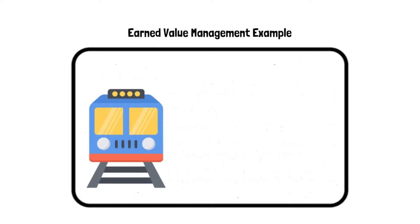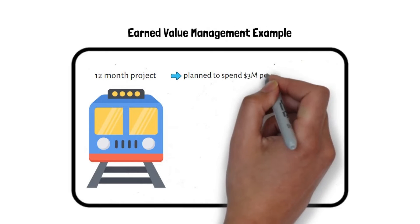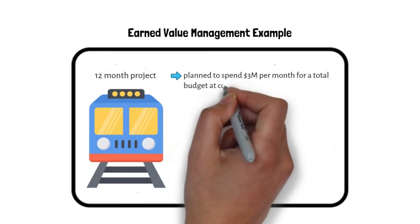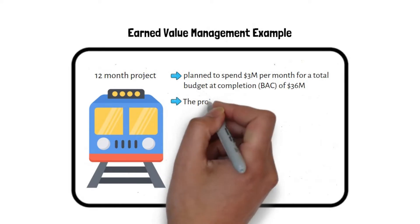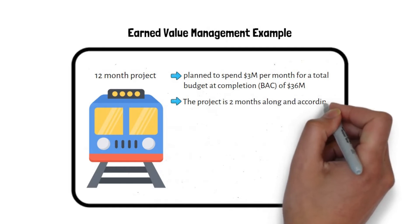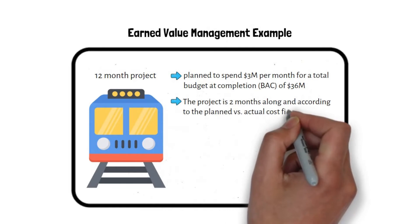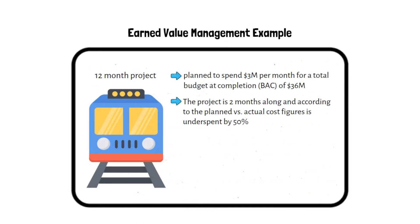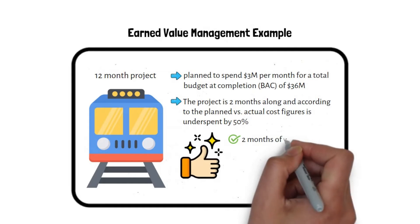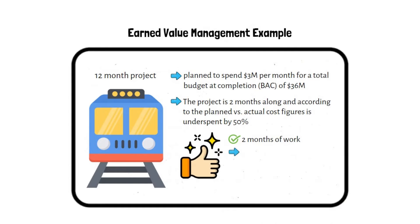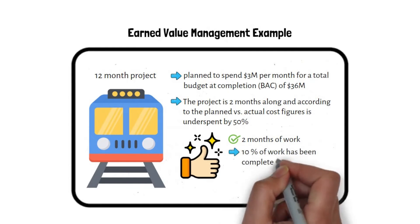Earned Value Management example: assume a 12-month railway project planned to spend 3 million dollars per month, for a total Budget at Completion of 36 million dollars. The project is two months along and, according to planned versus actual cost figures, is underspent by 50%. We might assume the project is going well because it's costing less than planned.